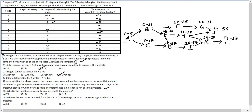For project 2: Stage A starts on day 6 and goes to day 10. Stage B has two constraints — after day 10 and after day 21 — so it starts on day 22 and goes to day 37. Stage C goes from day 18 to day 29. Stage D starts on day 30 and goes to day 39.